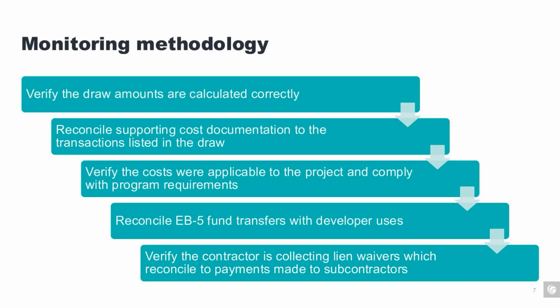Furthermore, what are the program requirements as far as allowable costs? Are there any elements, either based on funding, any kinds of bank requirements, or third-party lender requirements, that may restrict the use of funds for certain kinds of activities? So therefore, not only do we look for the accuracy and documentation of these costs, but also ensure that there are no covenants around how dollars are being spent, and if there are covenants, that those dollars are being spent within the rules and regulations of the program.